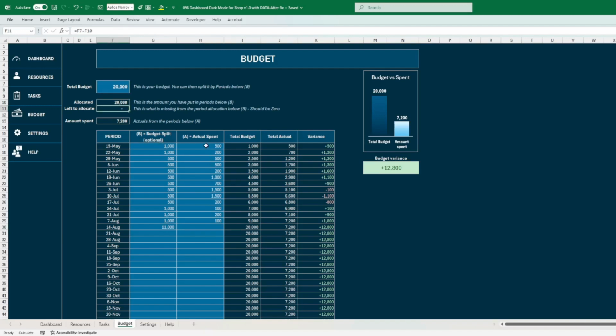And this is telling me month by month how much money I've spent. And this is what you need to do to stay on top of things. You have to put your budget here every month, and therefore that calculates the variance. I'm not going to go into the burn rate and the likes, but this is what you need to do. This will show you if you are ahead or behind of budget.